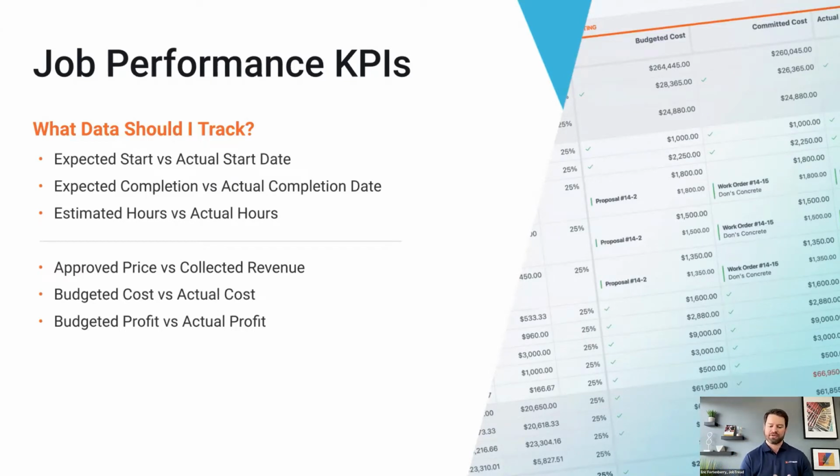My real advice, as we got into it and learned what we needed to do, was we need to set our budget. When we send out a proposal, no more making up prices. Our budget is going to be established when the customer signs off on that, and then we're going to manage all of our cost along the way. That's where we were able to drastically improve our profit margins. We increased our target gross profit margins by 43% once we started tracking our job cost.